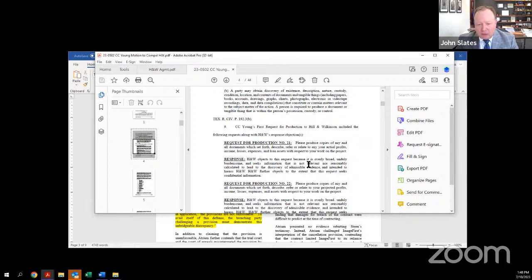So with respect to their need to see anything additional, we don't think profits has anything to do with it. We think that the fixed labor rate is, as described, fixed and not subject to audit. And we think that it's somewhat of a mischaracterization to suggest that this is a liquidated damage in the same context as those that would be available to an owner for late delivery.